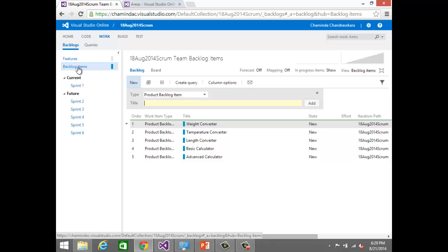He can bring things up, bring things down. He can decide what he is going to deliver to the customer, because he is the person who is mostly discussing with the customer. He understands what the customer needs, so he can prioritize. You can add items, but you can't add them to the top. You always have to add them to the bottom and maybe inform him, I think this is a valid requirement. So he may be discussing with the client and bringing it to the top, right?